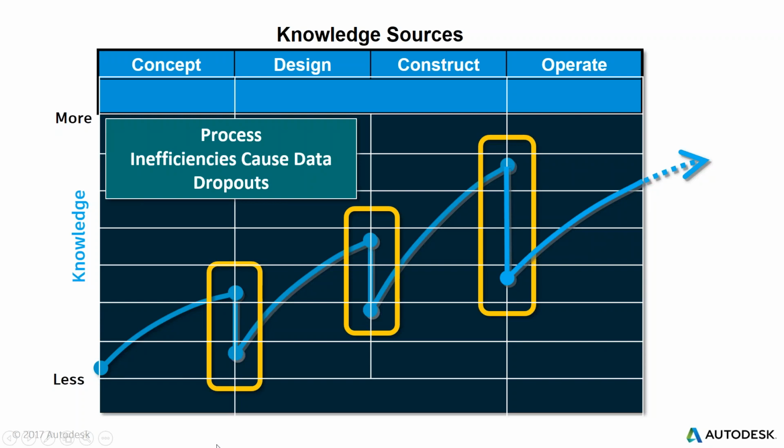And obviously, the weakest points are when you are transferring information or moving from one project stage to another project stage. Obviously, it has several reasons. The reasons might be that it has been done by a different company, or that you made the conceptual design 2 years ago, and before all approvals were received, information has been lost or forgotten, not maintained, and then you are starting kind of again, and you are trying to regain this knowledge.